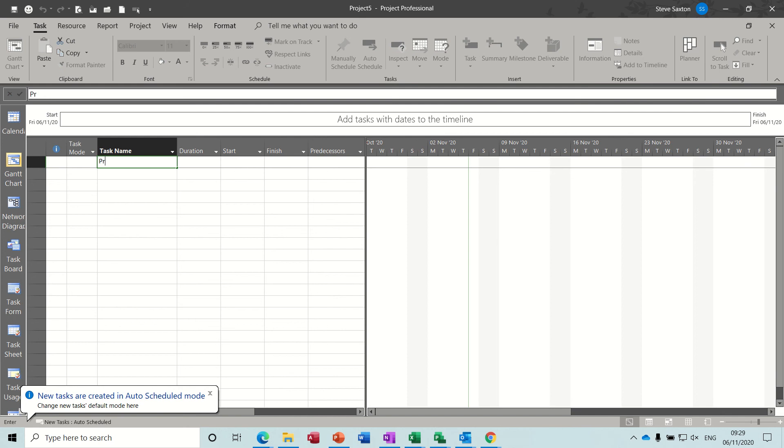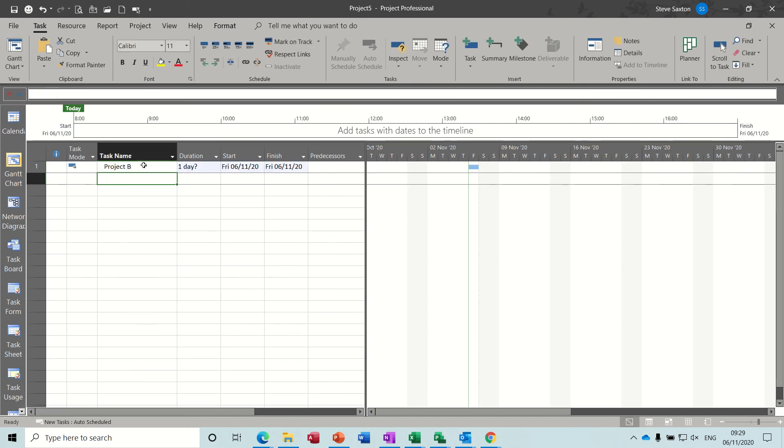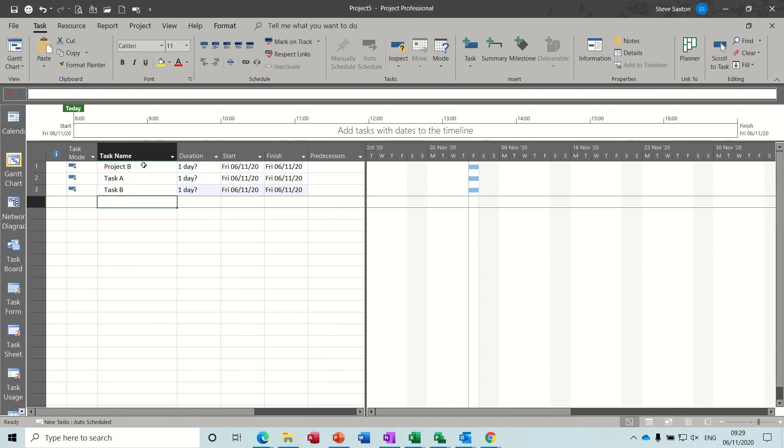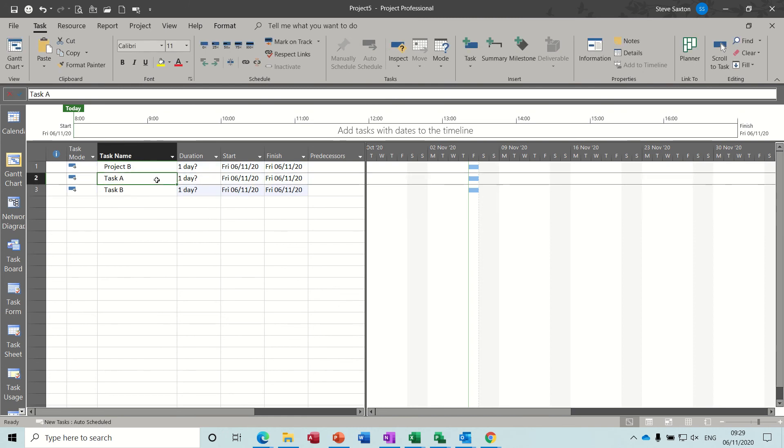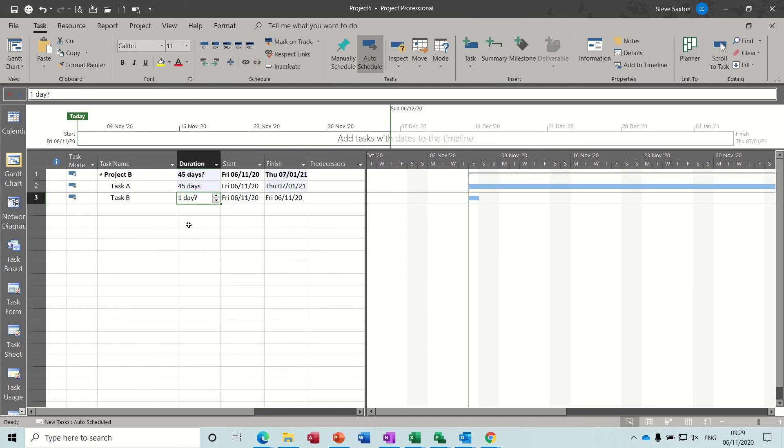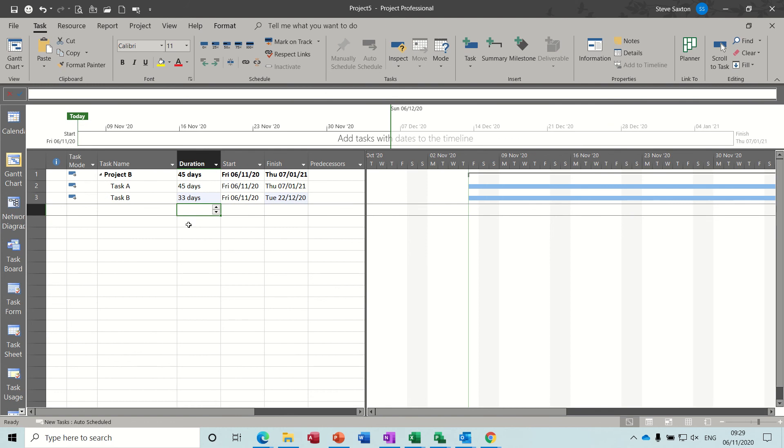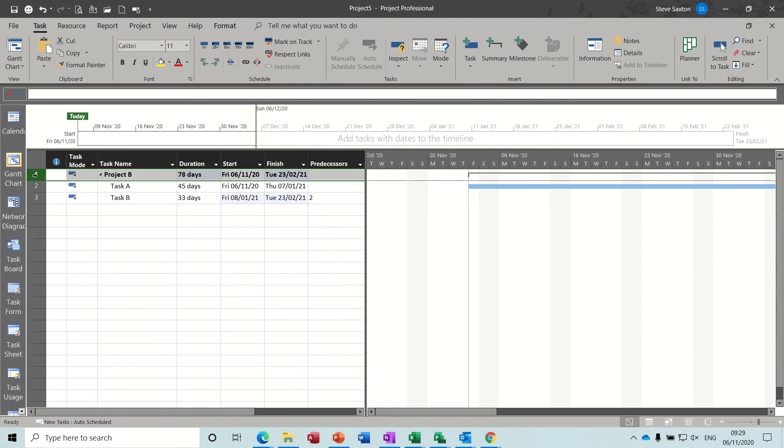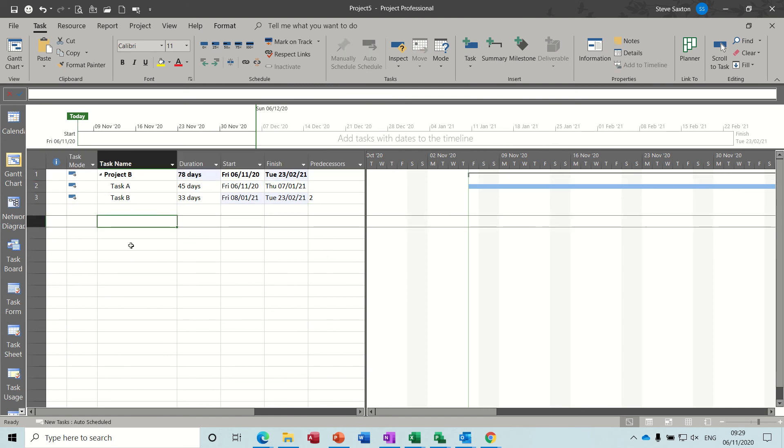So this is going to be project B. Project B. Task A and Task B. Indent those two. Give them some durations. 45 and 33 days. Link them together. Two. So now we've got two projects. Both with a timeline at the top there. This one's 78 days. I can't remember what the other one was, but does it matter.